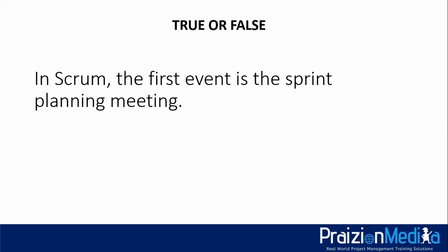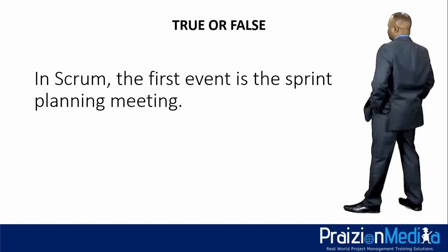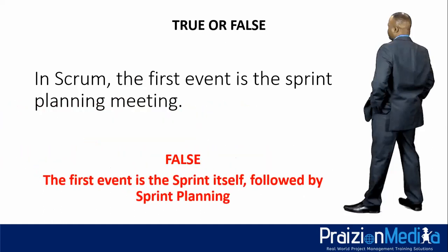Next question. In Scrum, the first event is the sprint planning meeting. True or false? 3, 2, 1. The answer to this question, it might shock you, but that is false. The reason it's false is the first event in the world of Scrum is the sprint itself, followed by sprint planning, because in the world of Scrum, this is how it is.